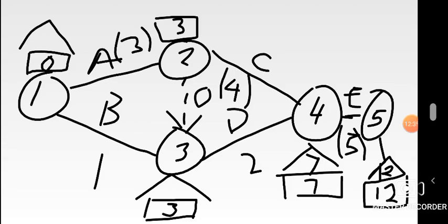Coming from 4 this time, going to 3 is only one route. Meaning just subtract the number that is along that route, which is a 2. So as of 4, what was your latest completion time? That number in the triangular shape, it's a 7. That's the one we get, because we're now dealing with latest completion time, and it's always found in that triangular shape there. So it's like 7 minus 2, giving us what? 5. That's what we record on 3. I hope you can see that.